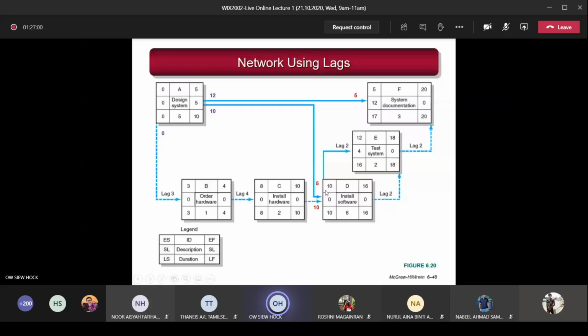Okay, then after that, this one goes back here, 10 goes back here because it's not a burst, just put 10. 10 minus 2 is 8. So this one coming here is 8, then you see a lag again. Back 4, then you minus back. So 8 minus 4 is 4. 4 minus 1 is 3.